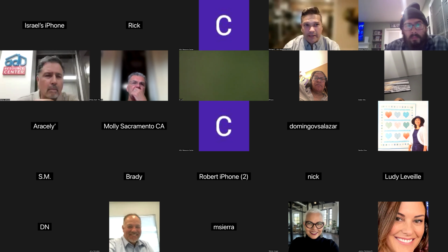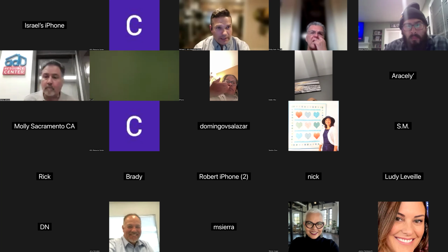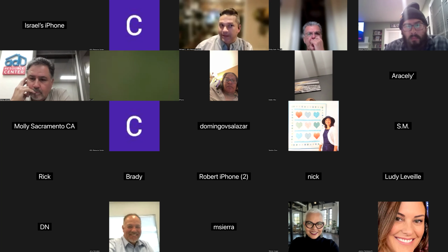Well, I can answer Rick's question because I think I have an idea of what he's asking. I'm pretty familiar with lien releases and what some folks are a little bit worried about. When a contractor hires a subcontractor underneath them to complete a particular task, say the tiling guy who comes in and does the tile work, that subcontractor legally has the ability to put a lien on a project.